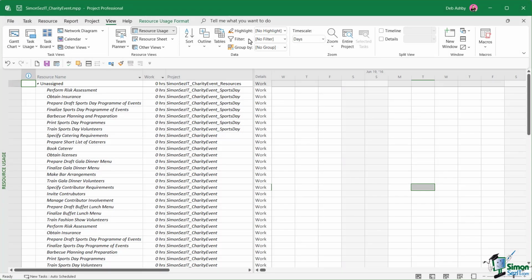In this lesson, we're going to set up a master project for our charity event. And we're going to start with our original project and the Sports Day project. And if you recall, these two share a resource pool. Now, when it comes to splitting a large project up, the key area where there is usually the most effort required is in restoring the links that existed in the original project. And as I've mentioned a couple of times previously, it's a good idea to make this decision very early on. So make sure that you decide if this is going to be a project that you're going to want to split up into multiple different projects as early as you can, because the later you leave it, the more work you're giving yourself.